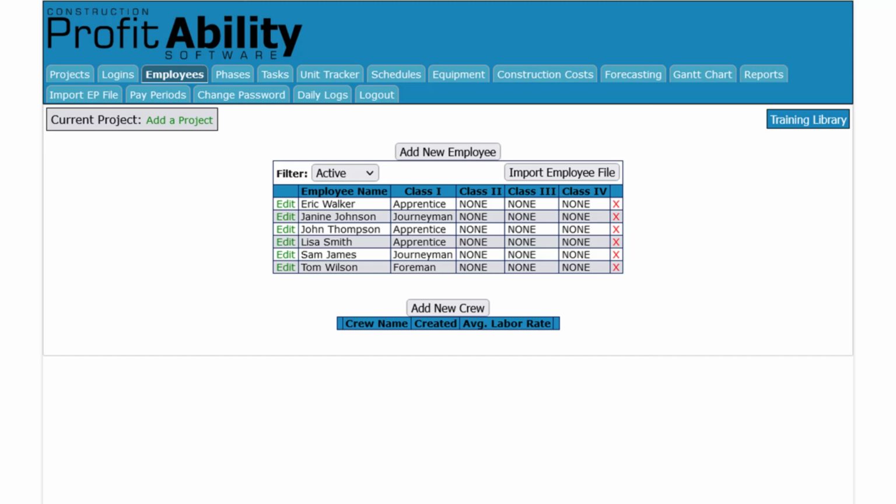Now, you know from my previous training that it's important to know what average labor rate was used to compile the estimate for your project so that you can try to keep your crew ALR in line with the estimate. And that's a good reason for your project manager or company to provide wage information to you. If you pitch this argument and they give you the wage info, you can upload it yourself. Otherwise, you'll need their support.